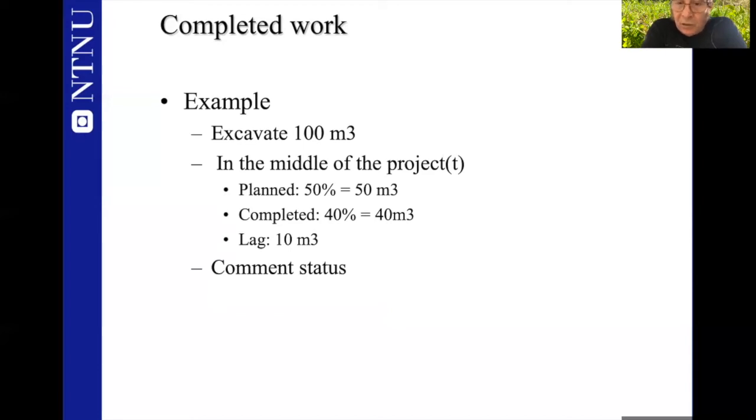You see that according to your timeline, you were supposed to excavate 50 cubic meters, and you find that you have excavated 40 cubic meters. Well, you would say that I have a lag of 10 cubic meters.